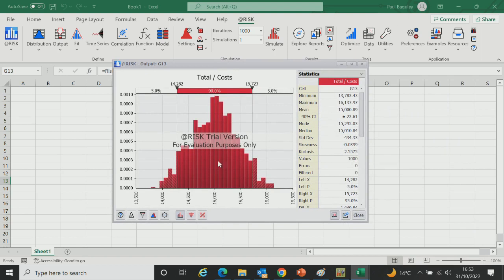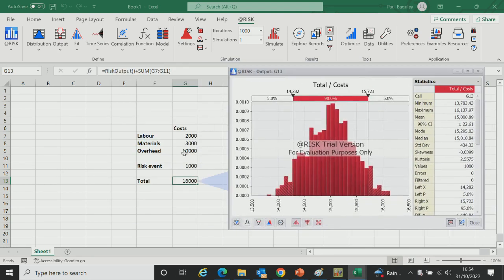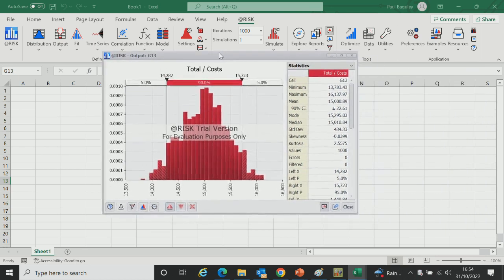So it builds up a histogram of 1,000 scenarios, because you have 1,000 scenarios running. It simulates a project 1,000 times based on probabilities and comes out with a frequency distribution of cost. Like this. So that's your Monte Carlo. So estimating uncertainty is all about, in practice, guessing these distributions and guessing the probability of the risk event to come up with your cost risk output. So that's the cost risk uncertainty bit.